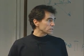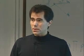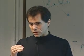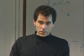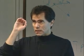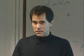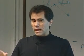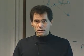And the final lesson learned is, as we're going through and making those mirrors, you construct what's called an error budget. You assume perfect performance, and then you step back and say, okay, I'm going to allow imperfect performance in this region. I'm going to allocate imperfect performance to thermal design. I'm going to allocate imperfect performance to the inaccurate knowledge of the source positions in the sky. I'm going to allocate some error budget to flexing of the optical bench. I'm going to allocate some error to the difference between how long the focal length is and how long I think it is.